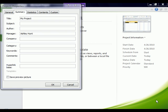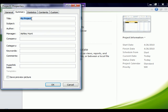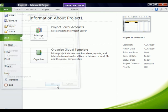Now that I've opened up the project properties box, you'll notice that it opens up here on the Summary tab. The Summary tab allows you to title your project and typically it'll say project one, two or whatever. You can just click right here in the box and name it whatever you like. You can put yourself as the project manager and whatever company you happen to be working with. Whatever you put up here in the title box will show up as a project summary task provided you turn that option on. That option is not turned on standard, but I want it to be at the very top of my project and I want it to track totals. Total durations, total dates and so forth. So in order to do that, I first have to come into properties, name my project, and click OK.